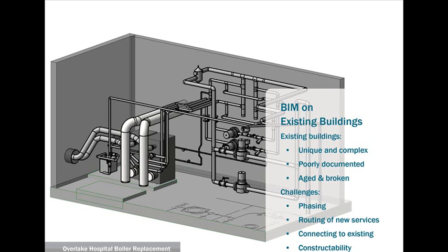Making sure that routing, as you described on the drawings, is actually possible. And describing to the contractor where those points of connection are. It's very important so that the contractor doesn't waste a lot of time and spend much of the owner's money trying to find those specific little points of existing water piping or whatever that you alluded to on the drawings.